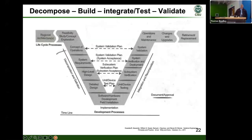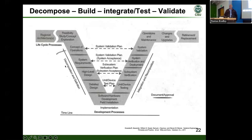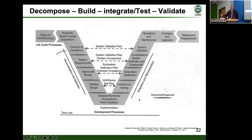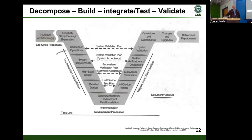We have the systems engineering V, and in broad brush, we start in the upper left with needs analysis and feasibility, then decompose down in search of knowledge because we have questions that need answers when dealing with state-of-the-art uncertainties. There is a test and evaluation component happening all along the left side of that V. At the bottom we start building, and then there is an integration and aggregation aspect going up the right side that is also heavily test-and-eval dependent. T&E is not a speed bump at the end — it is integrated throughout the entire V.